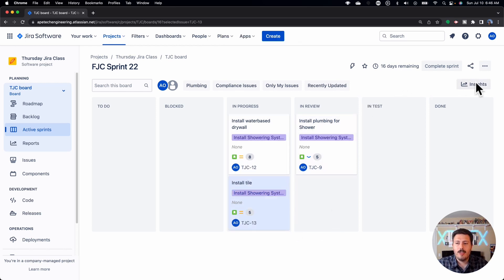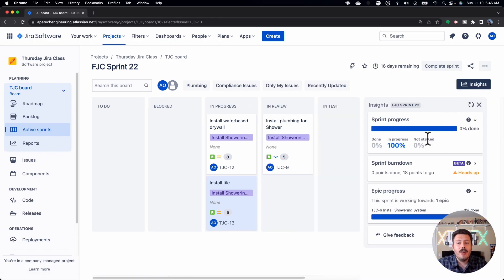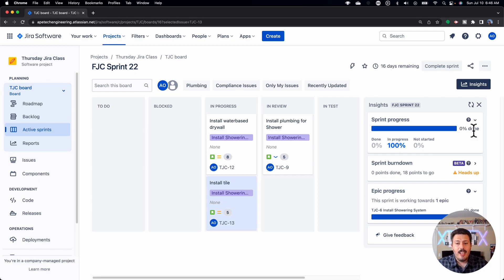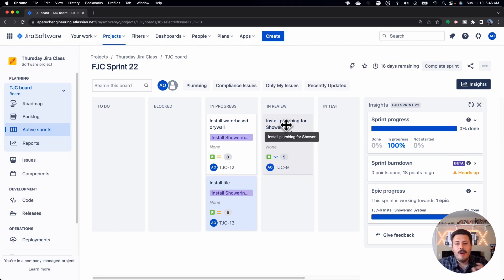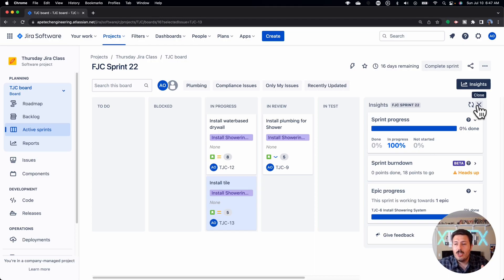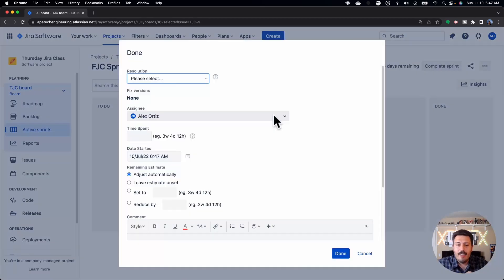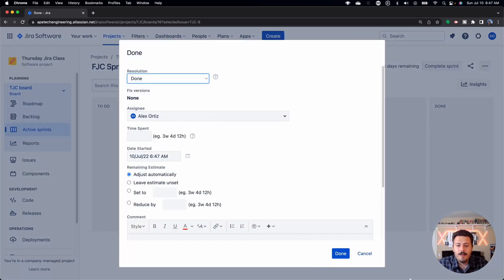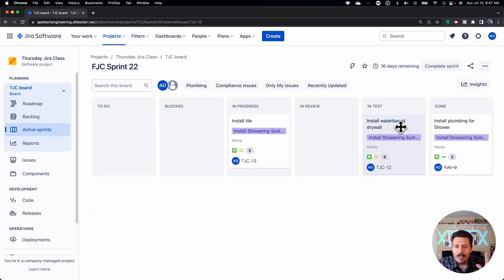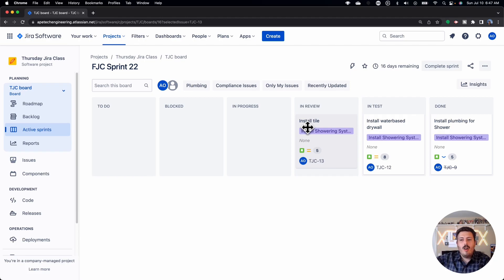Another tool that you have here to your disposal is yet another insight. This is a different insight, but it's going to tell you your sprint progress. So if you're halfway through the sprint, and this thing is still showing 0% done, this is where you have some red flags. This is where you, as a Scrum Master, you can start taking some actions and start figuring out where things are stuck. Maybe the lead that's doing all the peer reviews is out, and so that wasn't communicated, and you're going to have a bunch of issues stuck in review. Maybe the build system is down, and none of the unit tests are running, and so everything's stuck in test, and then again, that's another thing where you can go and take an action and try to help get that resolved. But the name of the game is to get everything to this done column as best and as easily as possible.